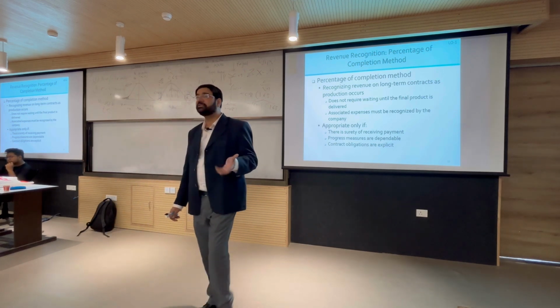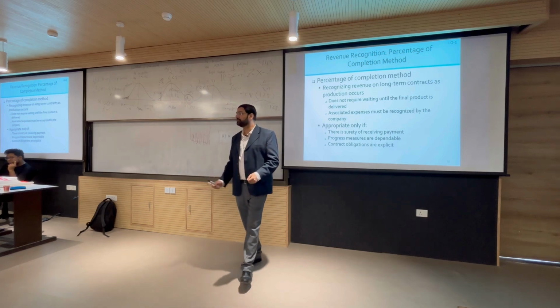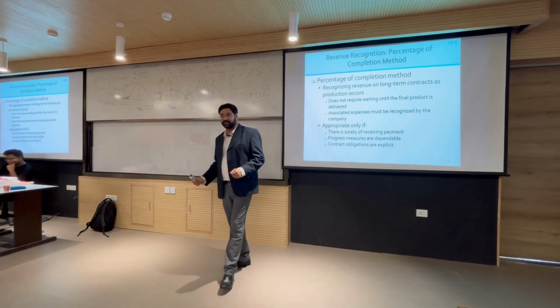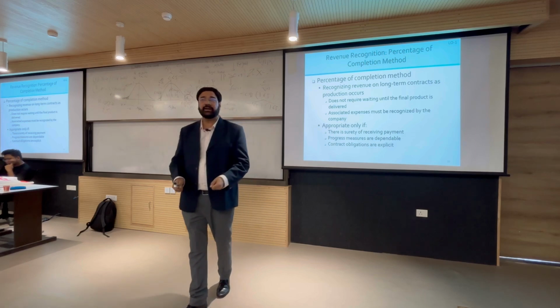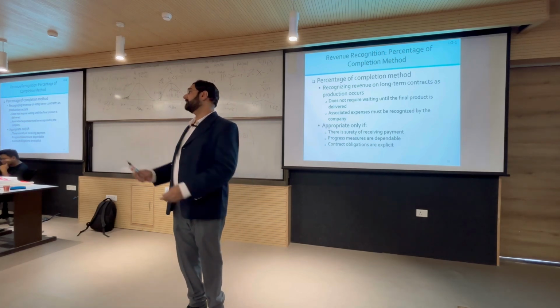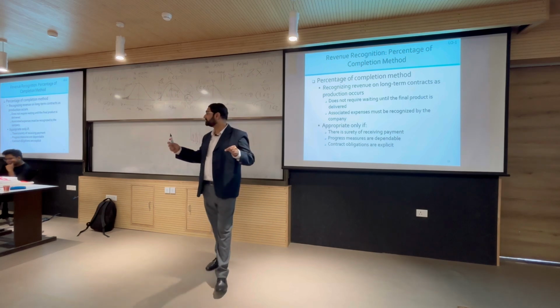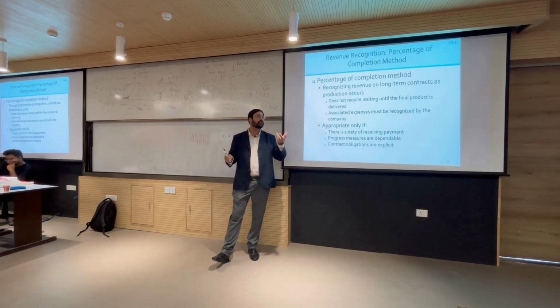For any machinery or anything at any project site, you will see they will have commissioning. Somebody has to go and commission the machinery. So, you have to do commissioning at the site, and once the commissioning happens, then you get another 5%. And then final testing or provisional testing, we will give another 2 or 5%.